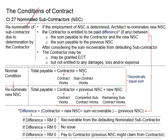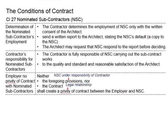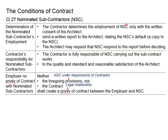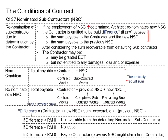We talk about the renominations of the subcontractor due to the determinations of the contractor. This is an extension from the clause related to the determinations of the nominated subcontractor. Now that the nominated subcontractor is proven in default, the nominated subcontractor shall be terminated from the project, and the architect will need to renominate a new nominated subcontractor for the remaining works.